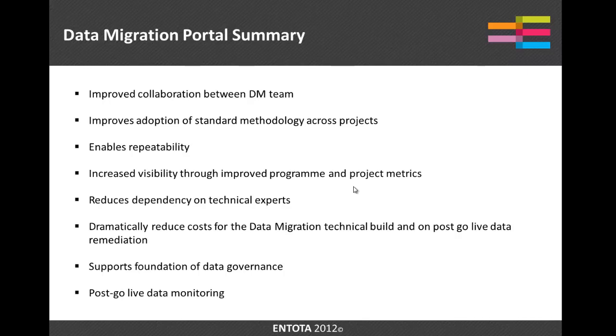What we're saying is to bring that into a standardized approach, a standardized methodology and a standardized area that allows process control over the governance of your data migration project, from the data definitions, the inventories, the mapping specifications, sample identification so you can test run jobs without making any changes to your code, and things like the value mapping as well. All of that is handled centrally on a single instance and can then be replicated out for regional implementations compared to global implementations.